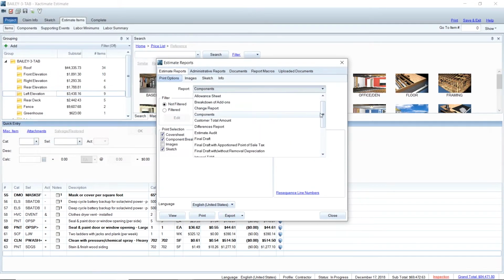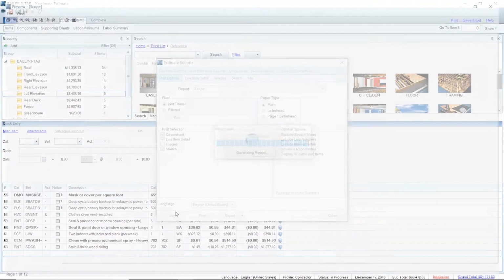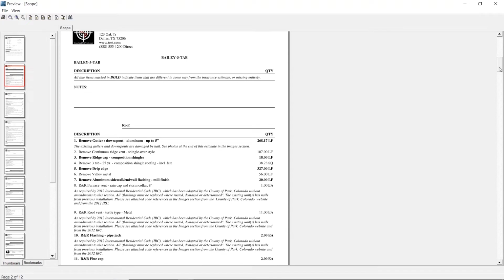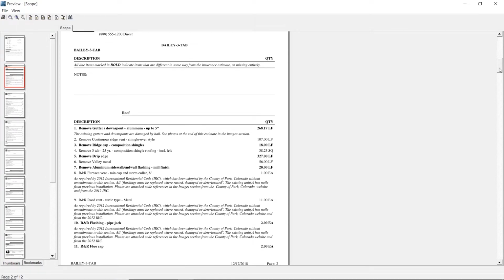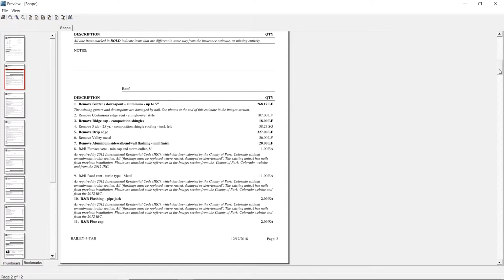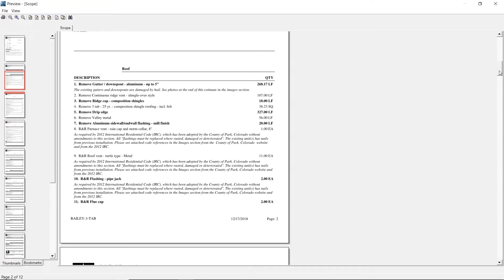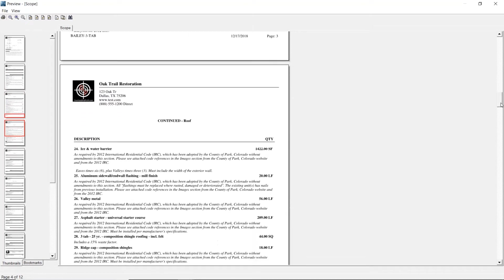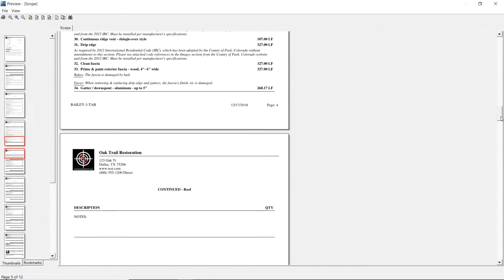And then I'll export the scope report, and the scope report looks like this. And this is key. This is something you can give to your subs or your crew leader, somebody that you didn't really want to know what was approved or what you're getting paid on the job. Sometimes it's useful to give to the client. Like, yeah, I've got the estimate done, and this is what I've come up with. This is about accurate to you. They're not seeing the sticker shock of the prices from it, but they can clearly see that all these scope items are in line.